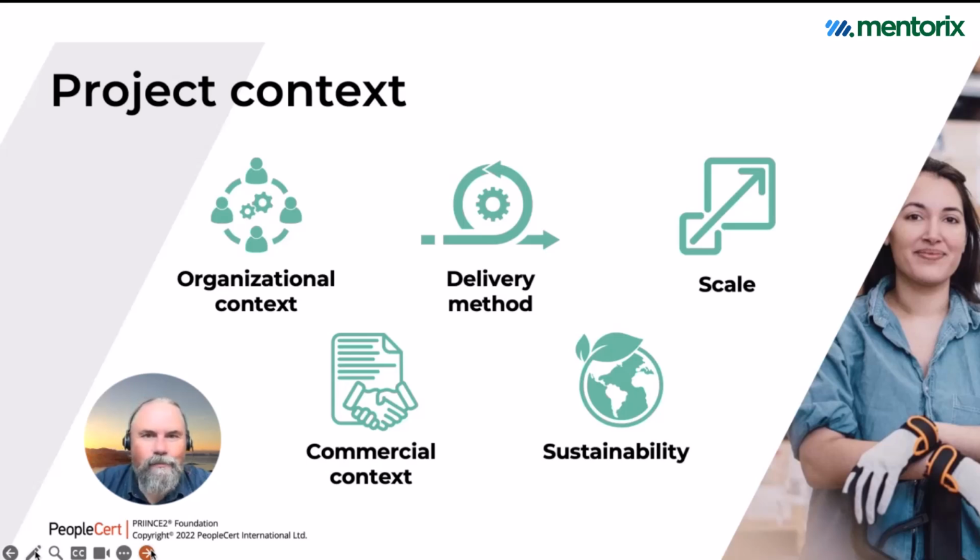If you took Prince2 by the book and implemented all the management products and all processes and everything by the book, you will most likely end up with a very heavily over-administered project. So that's not a good idea. So scaling is an integrated part. It's actually one of the principles. You need to make sure that the use of the method fits the project context, the organizational context, and the scope of the project in totality.